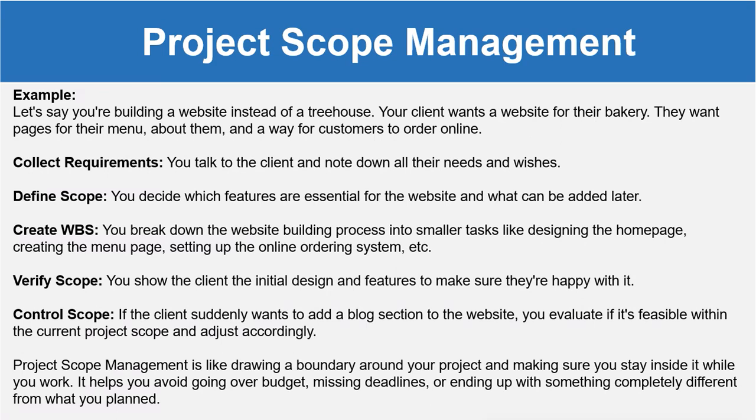Like for example, if that is not part of the scope as per the scope document, you can simply talk with the client and say that it was not part of the scope, so you can handle it after some time in the execution with a separate CR with a new requirement.